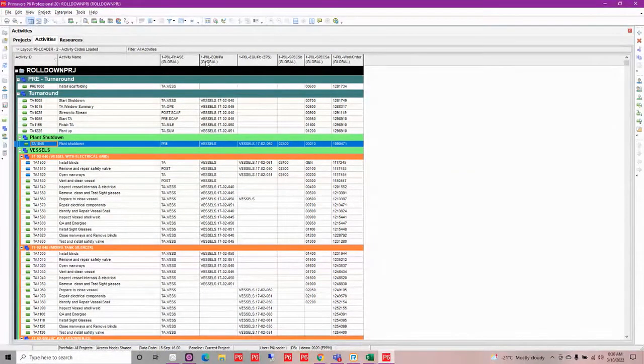So not only do I want to clean these up, but I also need to push down to the EPS level some of these codes as well as to the project level. My phase code actually is only used in a particular EPS that this particular project is in, as well as my equipment code. Now my specs and my work order are codes that really just need to be at the project level. They only are important to this project, and so that's the only place I need them.